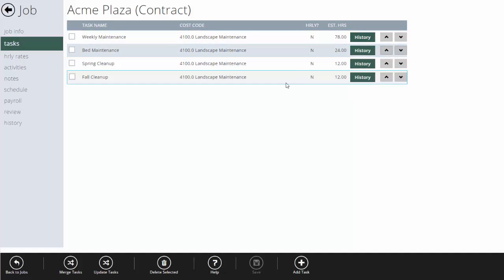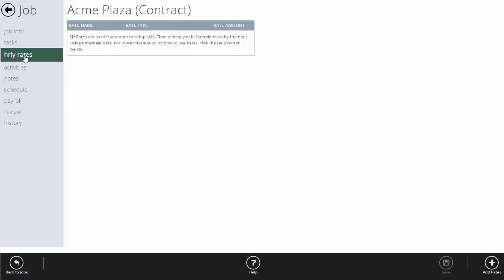Each task has estimated hours and some other factors I'll get to in a moment. I don't need to set up any rates on the job. If this job is an all-inclusive contract, then I'm not billing anything over and above the contract price by the hour, and rates are only used when you're going to bill some services by the hour. For instance, if I was going to do extras at $50 an hour, I could set up a rate called '$50 an hour for maintenance extras' and set up a task called 'extras' to track that. But this is all-inclusive, so we won't cover that in this video — we'll show it in the next segment.